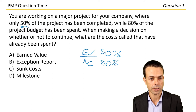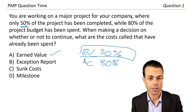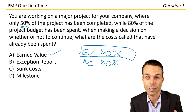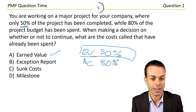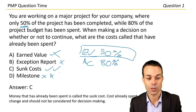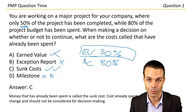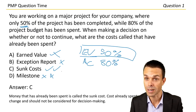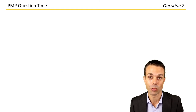It's not a costs question then — it's a decision-making one. It's not earned value, even though it looks like it. It's the sunk costs. And we don't look at these when making decisions on whether to continue the project because it's already been spent. So it's not the exception report, not milestones — let's go with letter C. Money that's already been spent is called the sunk cost. Cost already spent cannot change and should not be considered for future decision-making. That's also very hard to do in practice psychologically, so keep that in mind in the real world.